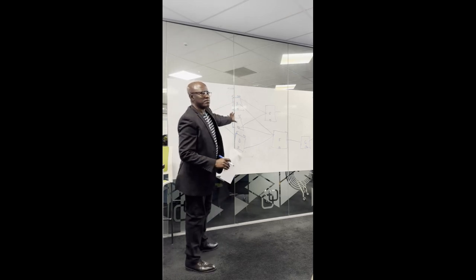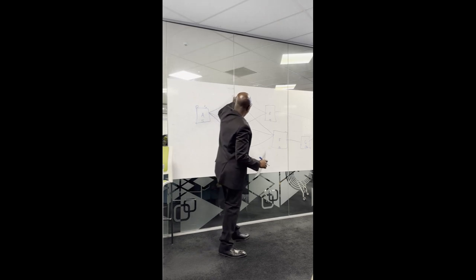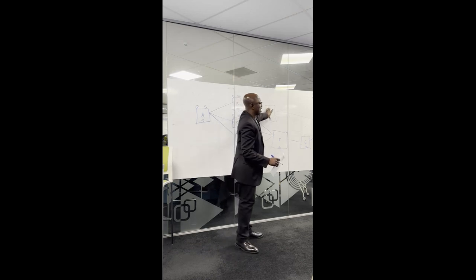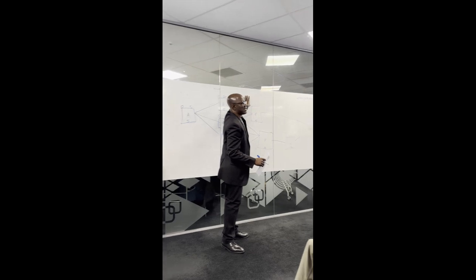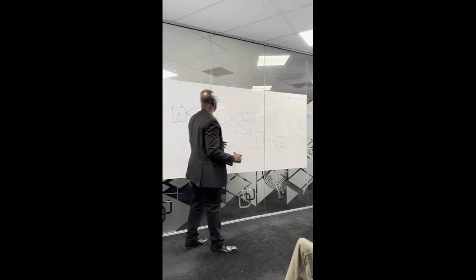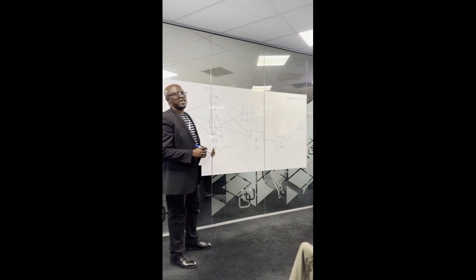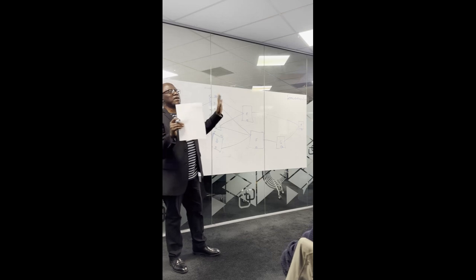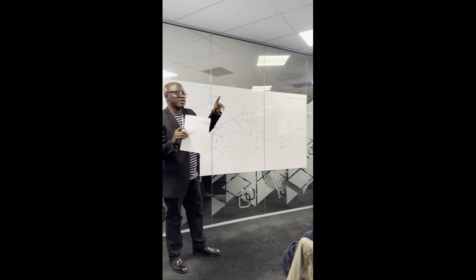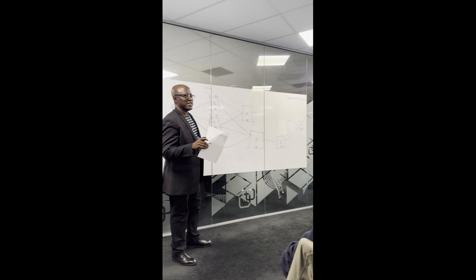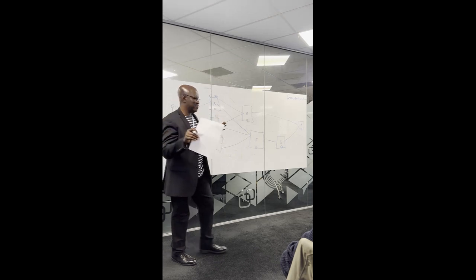Now, it's a cluster now. Activity B and C must be completed before activity E starts. Now, on what day will this activity E start? 20. Why 20? Because it is the finish date of B, which is 20. B is the longest.